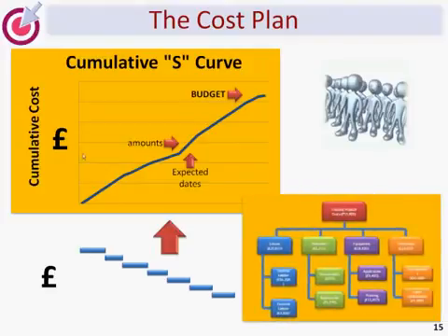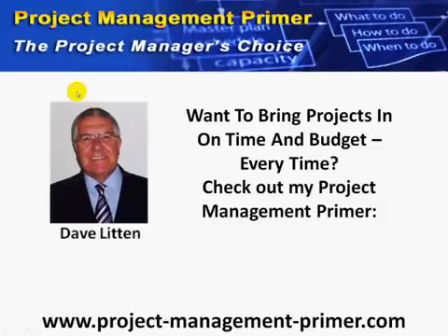Again, can I remind you that going back to breakdown structures, do you remember we looked at cost breakdown structures? Here's a simple example showing again how you might split a project up into labour, materials, equipment and overheads. This giving you the total budget. Okay, so that brings us to the end of the second step.